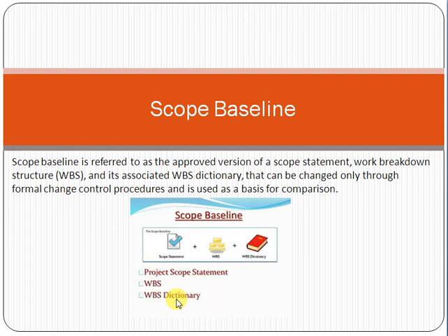This is the task. So WBS dictionary, you can just imagine that it will contain all the detail related to that. For example, who will do this task, which scope requirement it pertains to as per the scope definition, which RFP requirement it pertains to,